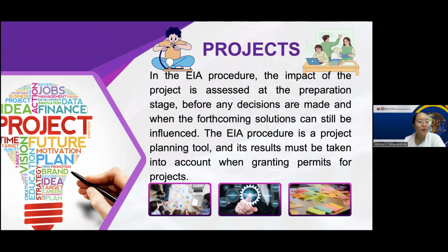The project developer is responsible for the environmental impact assessment, which is overseen by government agencies like the Center for Economic Development, Transport, and the Environment. So the public and affected authorities can participate in the environmental impact assessment process. The environmental impact assessment law specifies which projects really require an assessment, but smaller projects may also be assessed if they have significant environmental impacts.